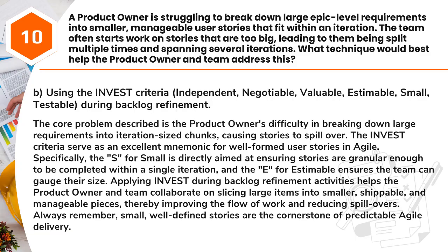Applying INVEST during backlog refinement activities helps the product owner and team collaborate on slicing large items into smaller, shippable, and manageable pieces, thereby improving the flow of work and reducing spillovers. Always remember, small, well-defined stories are the cornerstone of predictable Agile delivery.